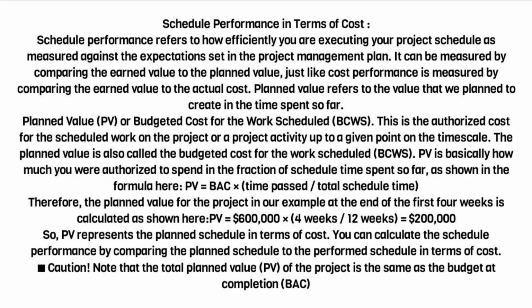Schedule performance in terms of cost. Schedule performance refers to how efficiently you are executing your project schedule as measured against the expectations set in the project management plan. It can be measured by comparing the earned value to the planned value, just like cost performance is measured by comparing the earned value to the actual cost.